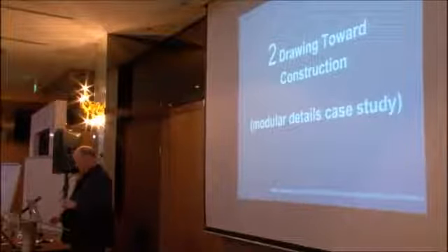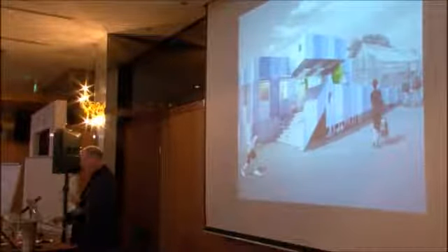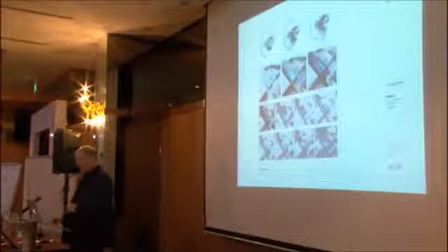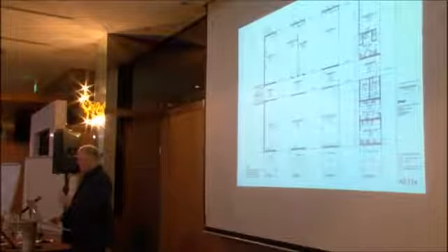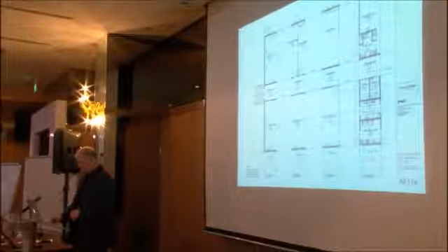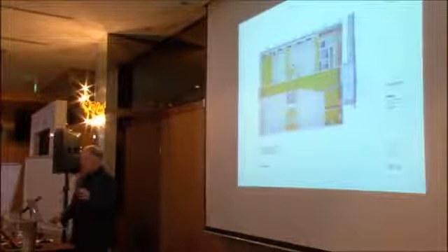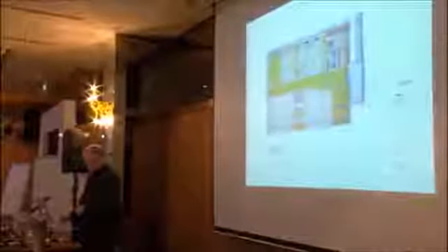This becomes more clear. This is a project for Harvard University, a small classroom building that was a very low cost, very high speed construction process, about 6 months design and construction. A modular building that was built halfway across the country, had to come together in pieces. So again, the drawing process is very different in working with manufacturing contractors as opposed to general contractors.